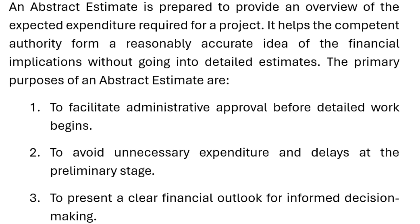Definition and purpose: An abstract estimate is prepared to provide an overview of the expected expenditure required for a project. It helps the competent authority form a reasonably accurate idea of the financial implications without going into detailed estimates. The primary purposes are: to facilitate administrative approval before detailed work begins, to avoid unnecessary expenditure and delays at the preliminary stage, and to present a clear financial outlook for informed decision-making.